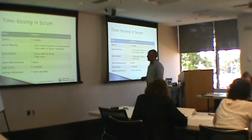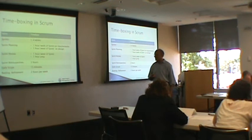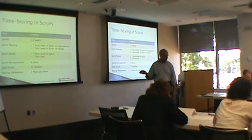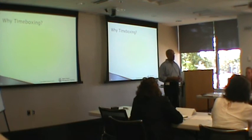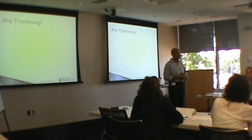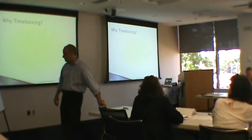Sprint planning is one hour per week of sprint. Sprint review is similarly one hour per week of sprint. Sprint retrospectives are about three hours for a two-week sprint. Why is time-boxing important? It gets you to the work rather than planning for the work. You're working, so you can't dilly-dally — there's a discipline to it that keeps the team moving forward.